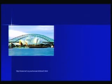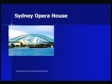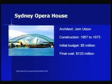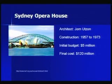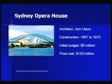What is this structure? Sydney Opera House. Anyone thinking of Australia thinks of the Sydney Opera House or the kangaroo — that is how you relate to Australia. It has become an icon, a landmark of Australia. But if you look at it as a construction project, it is a major disaster. The construction was supposed to take two years; it took nearly 15 years to complete. The initial budget was 5 million dollars and it ended up costing 120 million dollars. It could be called a construction project management disaster, even though the end product turned out to be a great project.